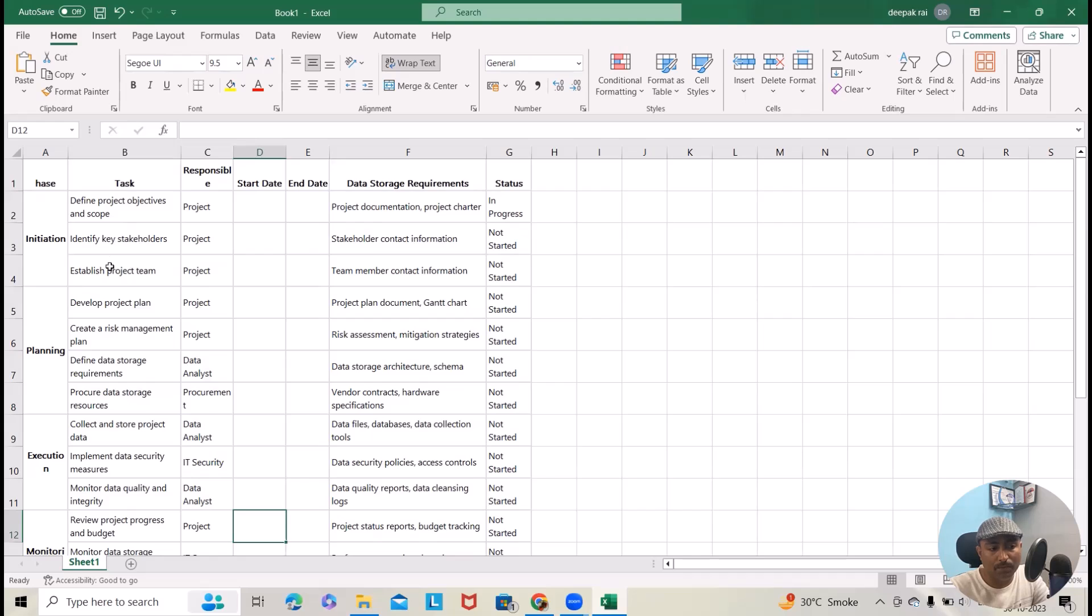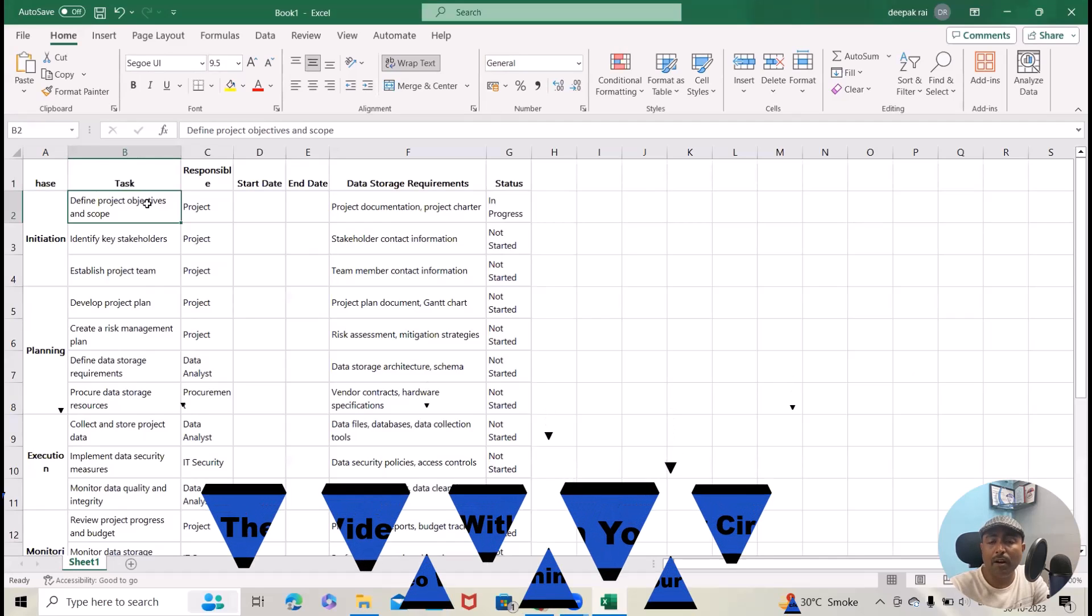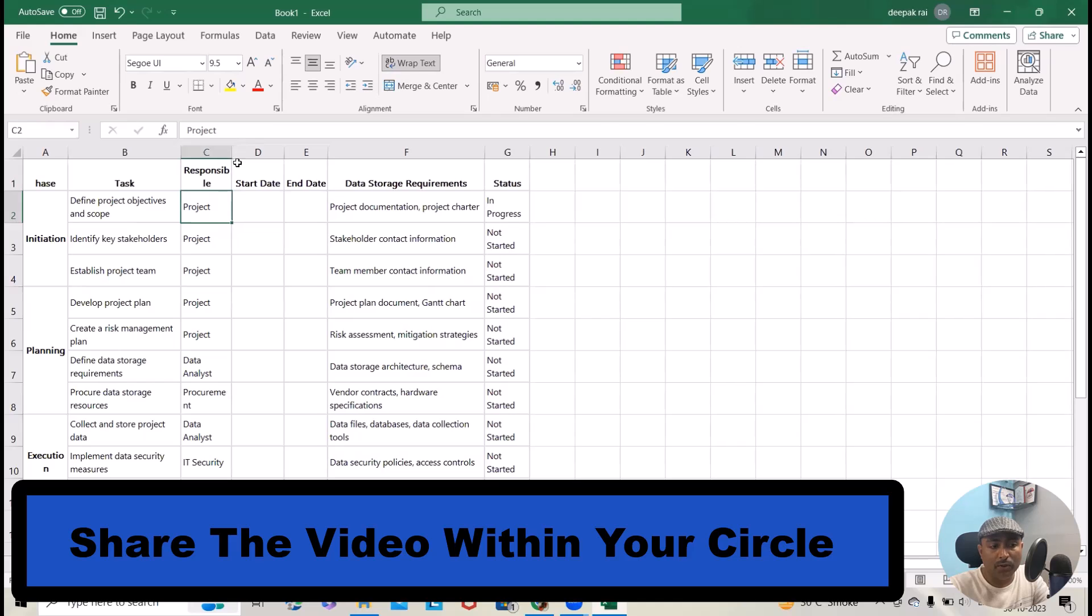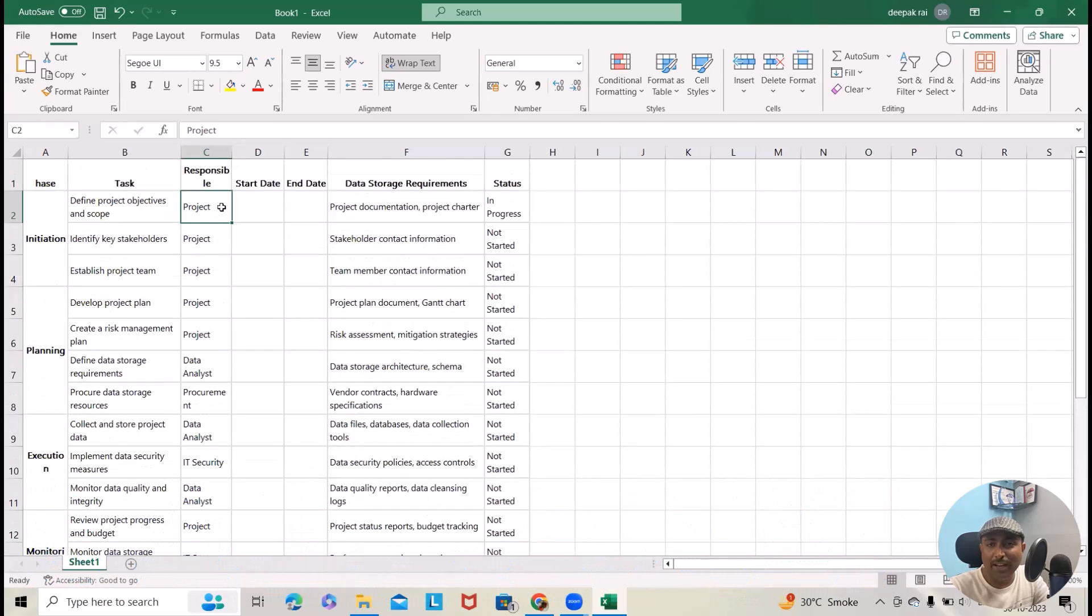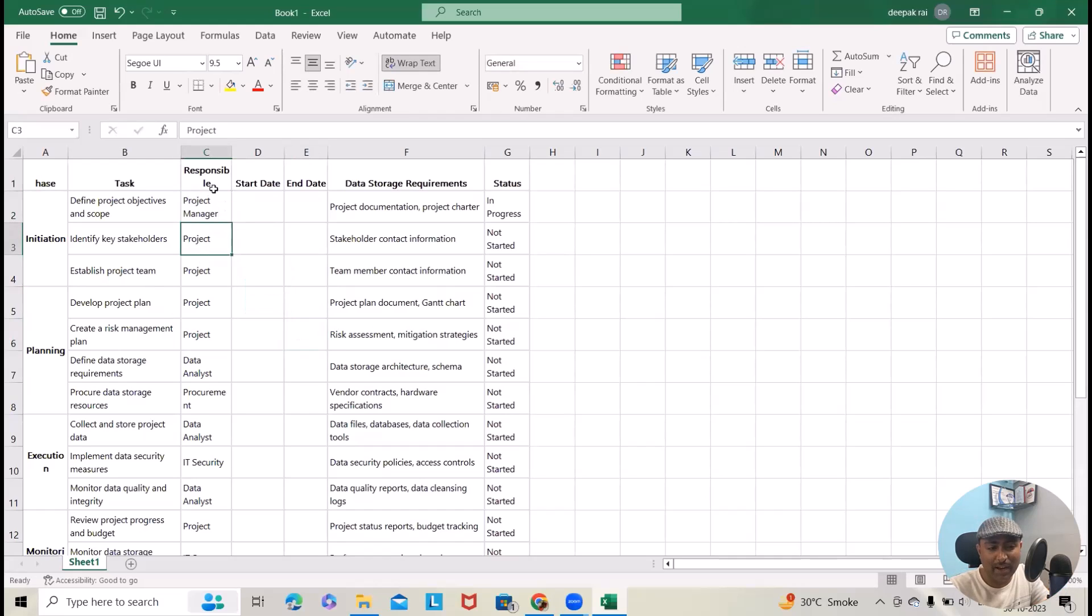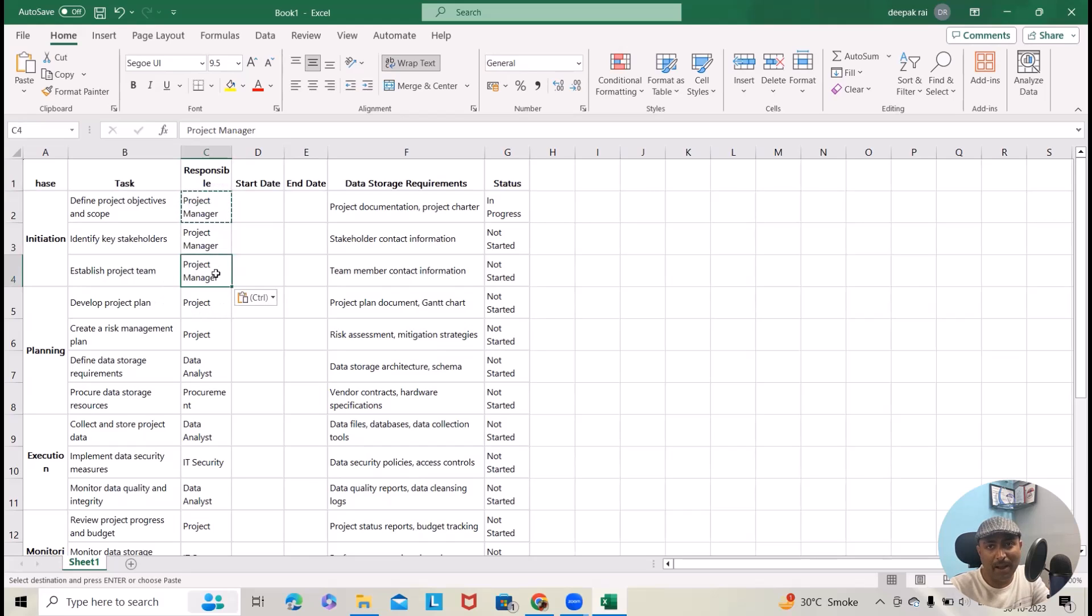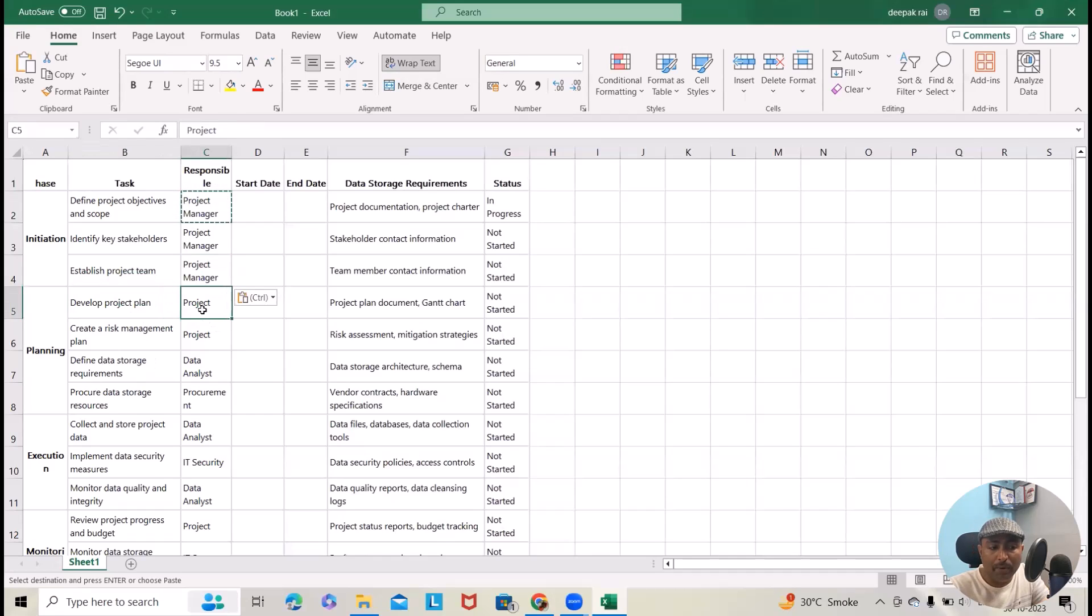Here we got 'define project objective and scope,' which is needed for any project drafting a project plan. Then responsible is project manager. Then identifying the key stakeholders—again, the task or responsibility of project manager. Establish project team—not only project manager will be establishing a project team. This will require different approvals and team permissions like development, QA, and UAT.